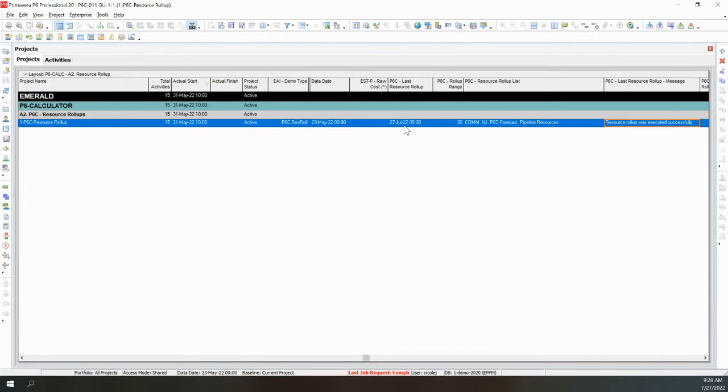So we could actually take a field and we can make a concatenated list as we've done here. So we've done this for, let's use a drilling client again. They wanted to see which drill rig was on each project, each well. And of course, you could see it if you open all the projects and you look at the resources. However, to do a very simple list at the project level in Power BI, being able to see it right here, much, much simpler.